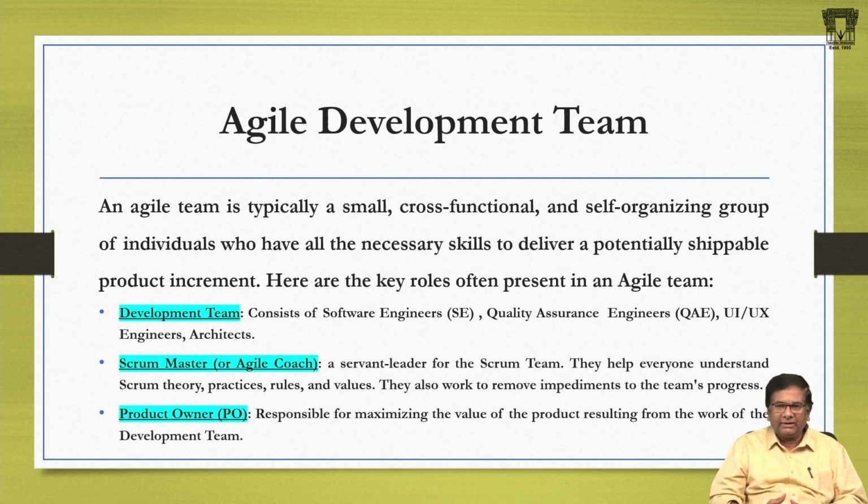Well, before we go to the actual team members, I just want to focus on a few keywords in this definition. I already talked about small. An agile development team consists of 3 to 8 developers, and that includes QA and other people. Now, when I say cross-functional, it's not just dev and QA. It is going to be like a UX developer or the security team, which works hand in hand with the development team in almost a day-to-day way. So this is what a cross-functional team is.